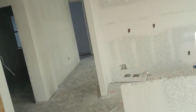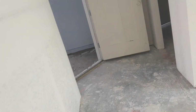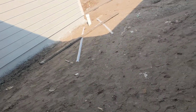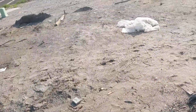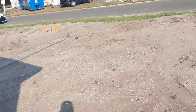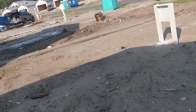Kitchen outlets look good. And I have a mighty punch list here I gotta get through. We're having a problem with Florida Power and Light. The underground utilities were done differently in phase 2. And so my electrician, he runs his conduit per a site plan. He runs it towards the location, right? And so FPL came out a couple times, and they can't find the end of his conduit where the end of their stuff is. So there's the conduit going down. So we were on the 12th, we're gonna have FPL come out here and with the electrician, and we're gonna put our heads together because these first few buildings on this side, we have no power hooked up. Across the street's good to go. We're moving along over there okay, but we got to get that figured out.